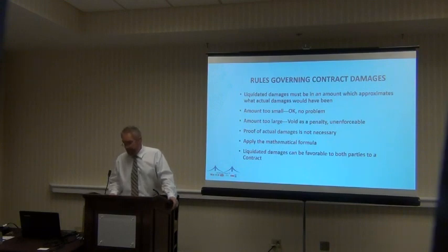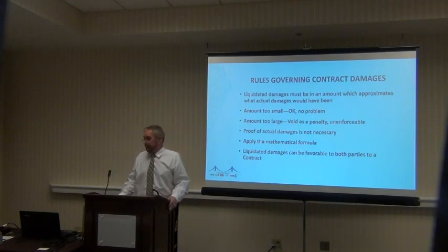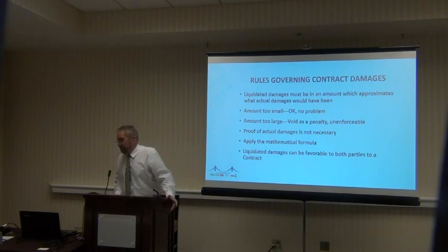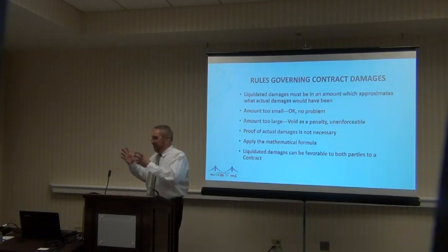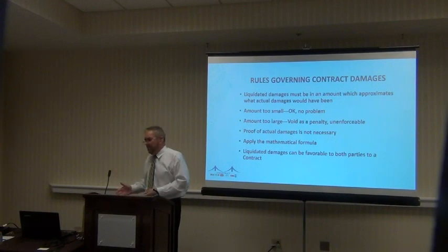Also, when some of the liquidated damages get to those extreme amounts, I've read that if it's offset by an opportunity for a bonus, so you have this extreme amount as a penalty for liquidated damages, if the contractor can earn a bonus by the same amount per day by finishing early, the courts would look at that as an offsetting opportunity and would allow those extreme amounts. I think that's a great argument. I am not aware of any Court of Appeals or state Supreme Court precedent saying that, but I think it's a great argument.